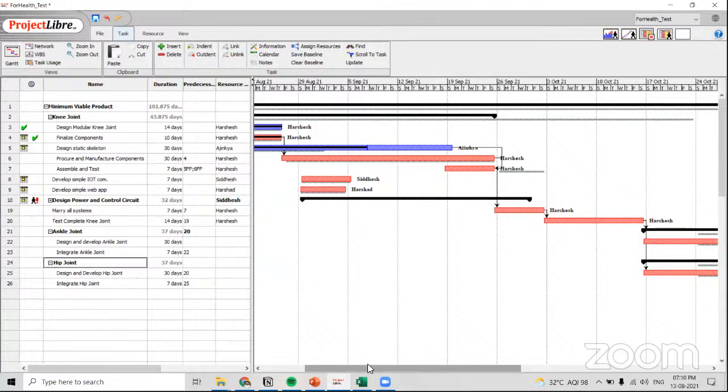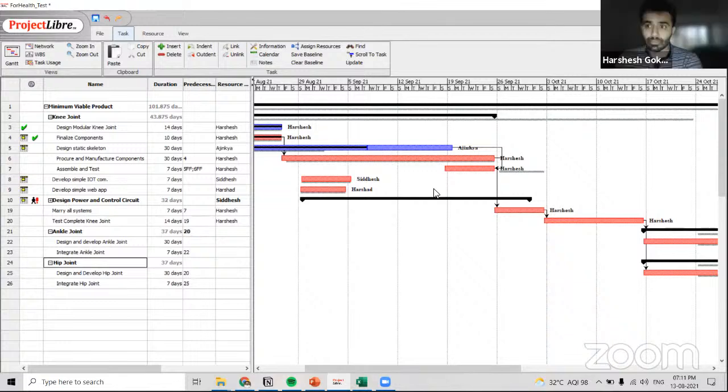And that's why the review of the past 7 days and next 20 days. This is the golden rule, okay? When I am sitting for a weekly review, what happened last week and what has to happen in the next 3 weeks? If you look at all of these together, you'll never have an issue.